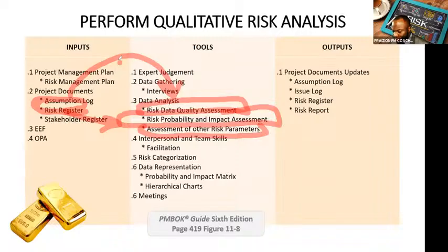Dormancy is like the sleeping giant. Dormancy is the period of time that may elapse after a risk has occurred before its impact is discovered. So the risk has happened, but you didn't even realize the impact it has because that dormancy factor is high. A short period indicates low dormancy. A long period means high dormancy, asleep for a long time, if you will.